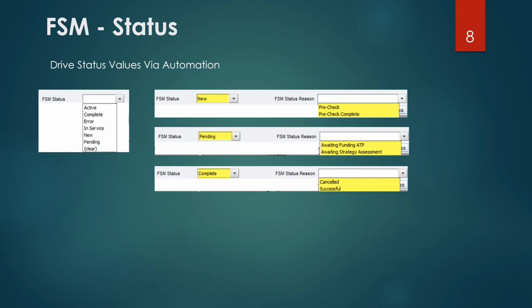And so we got around that scenario of them having to build a post implementation work order to do all the documentation after doing the change request, to now having an individual task that is categorized to say this is the in-service task. And when it gets completed, we trigger in service, and then I notify the enterprise service desk at that point that your product's finished, it's there.